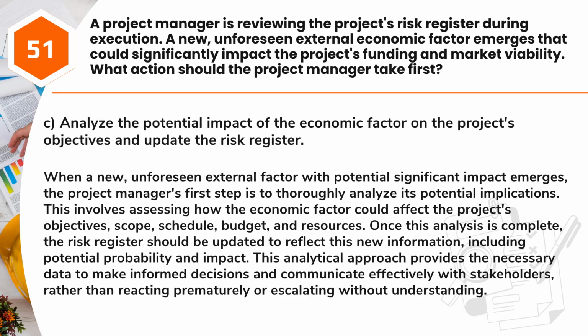Answer: C. Analyze the potential impact of the economic factor on the project's objectives and update the risk register. When a new, unforeseen external factor with potential significant impact emerges, the project manager's first step is to thoroughly analyze its potential implications. This involves assessing how the economic factor could affect the project's objectives, scope, schedule, budget, and resources.